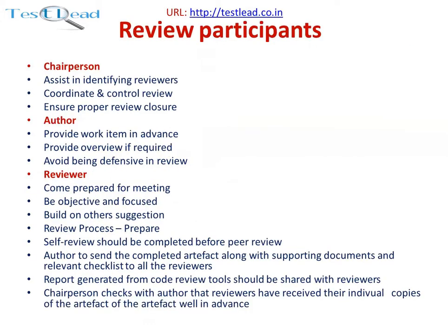Key review participants include the chairperson, author, and reviewer. The chairperson assists in identifying reviewers, coordinates and controls the review, and ensures proper review closure. The author provides the work item in advance, provides an overview if required, and avoids being defensive during the review.